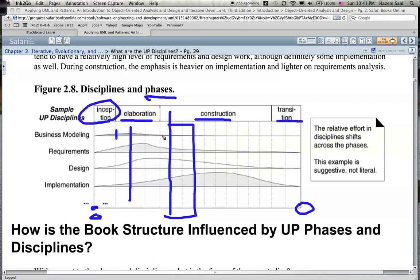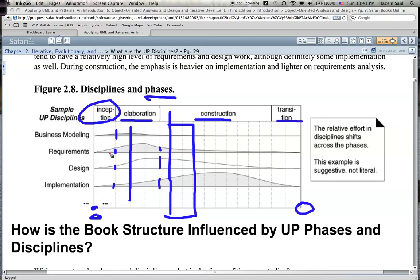Once elaboration comes in, that's when you elaborate on the project. You see considerable time is spent on business modeling, but very little time on business modeling occurs after the elaboration phase. There is a lot of time on requirements — the largest amount of requirement work is done in this phase. There is significant time on design, and a little time on coding, where you try out new ideas and create templates and prototypes for different functions and activities of the project.